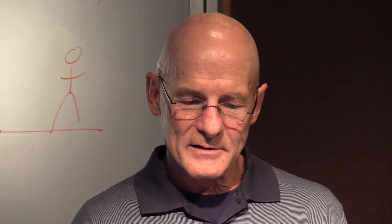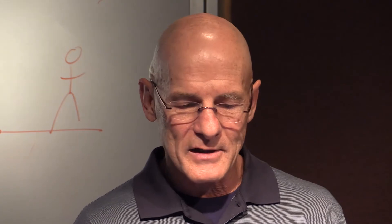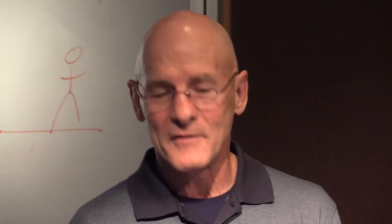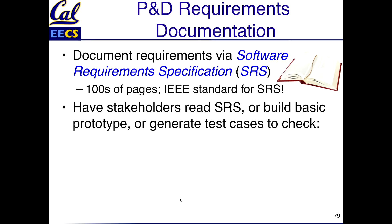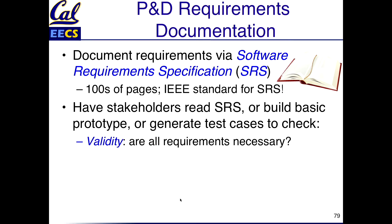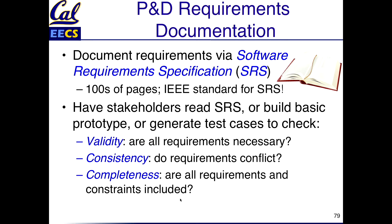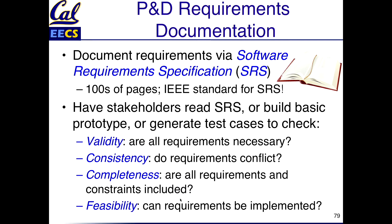How do you figure out if the SRS is okay? You can have the customers read these hundreds of pages and give feedback, build a prototype with some features, or generate test cases to test the SRS. You're looking for four things: validity — are all the requirements necessary? Consistency — requirements shouldn't conflict. Completeness — is everything there and are all constraints included? And finally, can it be implemented? You're building a kind of book about the project before you build the project.